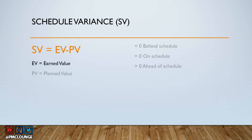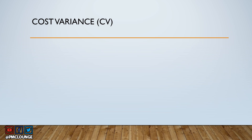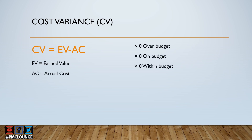Schedule Variance, or SV: SV equals EV minus PV. If SV is less than zero, you are behind schedule. If it is greater than zero, you are ahead of schedule. If it equals zero, you are on schedule. Cost Variance, or CV: CV equals EV minus AC. If CV is less than zero, you are over budget. If greater than zero, you are within budget — favorable. If equal to zero, you are on budget.